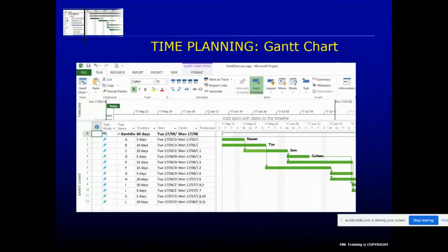Firstly, this is another example of the Gantt chart, and it shows you these lines. This is from MS Project, by the way. These lines are representing the sequence in which things happen. You've got a set of activities, how long each of them takes, and then the software, given your predecessor, which is, oh, here's the predecessor. So what it's saying here, activity C, do you see its predecessor is activity 1, which is A. So C cannot start till A has finished.